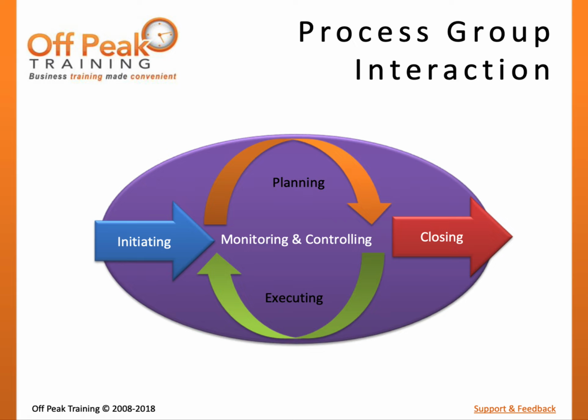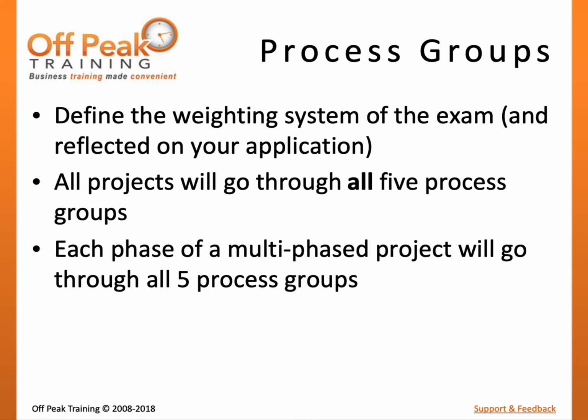As we continue to explore the 49 project management processes, it is important to remind ourselves that their implementation is not sequential, but rather an iterative approach. While it is not necessary to complete all 49 processes on a given project, it is fair to say that each project will go through all 5 process groups. In fact, if a project is segmented into different phases, we can say that each phase will also go through each of the 5 process groups. This makes sense since we said that each phase was kind of like a mini project.